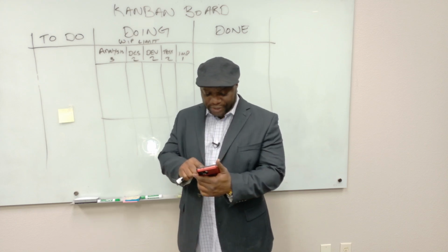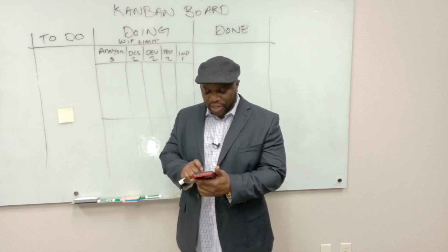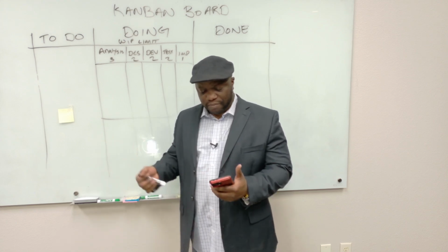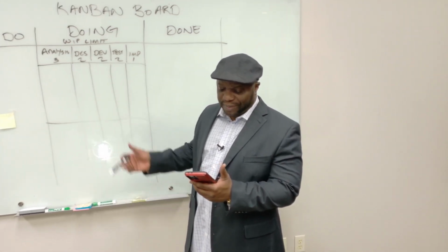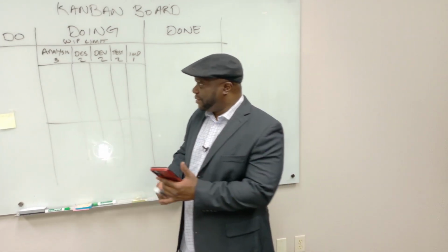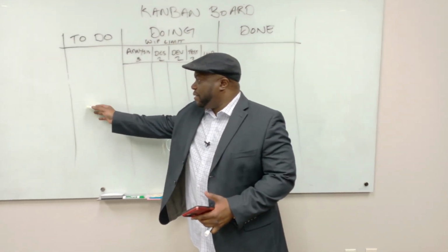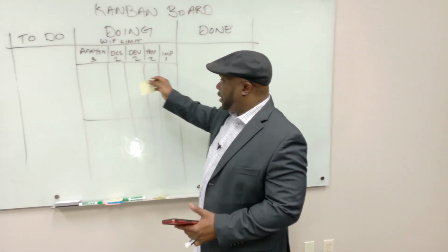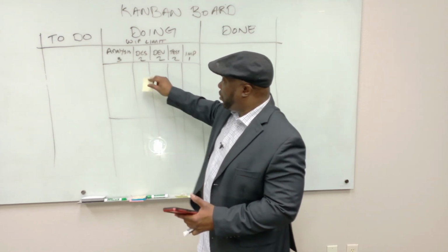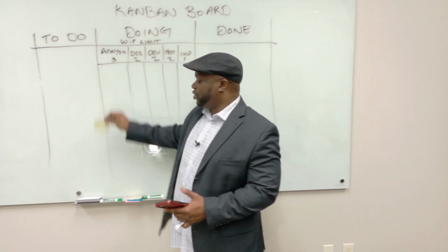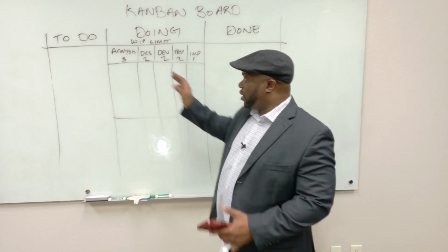So Kanban has some rules, and it has some, I should say, peculiarities. So WIP limits is one, demand is another. Based on the ability to absorb more work, if the WIP limits are not reached, then by all means, pull more work into the silo. But if you've reached your WIP limits, you've got to get that work done.